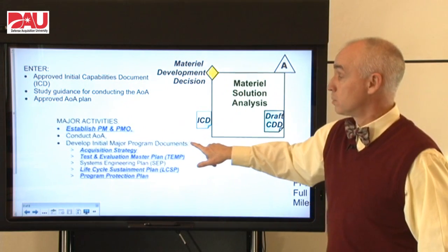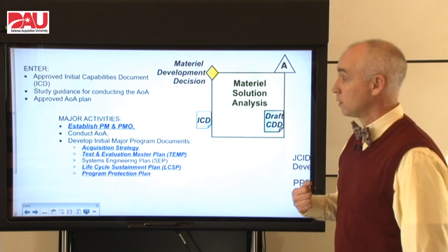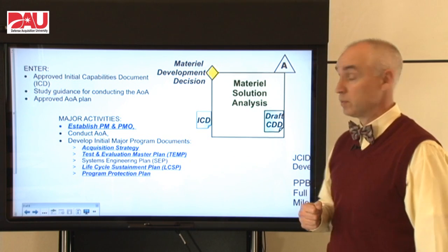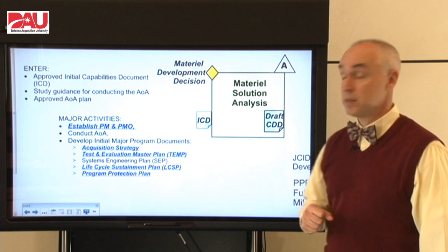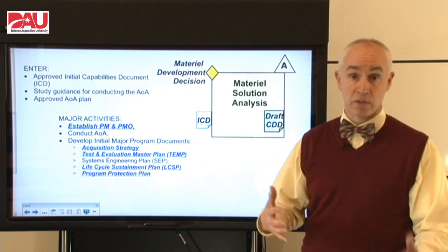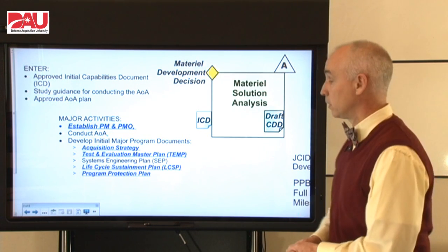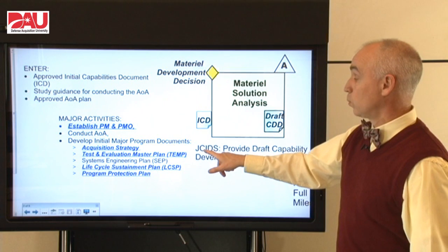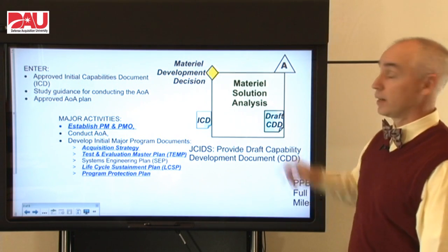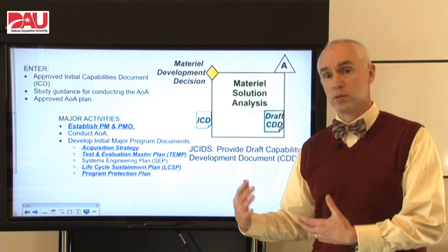During this phase, major activities include establishing a program office and a program manager. Then we're going to conduct the AOA — the program manager and program management office will oversee that, though it typically happens outside the organization. Within the organization, we're developing the major program documentation needed for the next milestone. This is typical of all phases: we're doing the analysis, design, and testing as the main effort while also planning for the next phase. In this case, our acquisition strategy is that plan. We need to interact with our users through the JCIDS system quite a bit, as they'll provide us with a draft capability document toward the end of the phase.